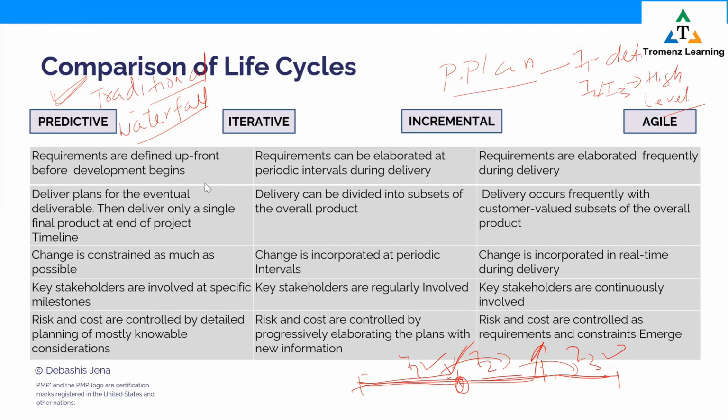Okay, I'm back. Sorry for the interruption. So we talked about iterative and incremental. Now look at agile, the other extreme. Agile is both. Here's the difference. Even in agile, we have iterations, just like the earlier two. But the difference is, watch, here iterations are rapid and so many. Like in iterative incremental, you have 2, 3, 4 large iterations. But in agile, you've got very rapid iterations. When I say rapid, it's like 2-week, 3-week, 4-week iterations. And how many? Lots of them, 10, 15, as many as required. So that's number one: iterations are rapid and so many.